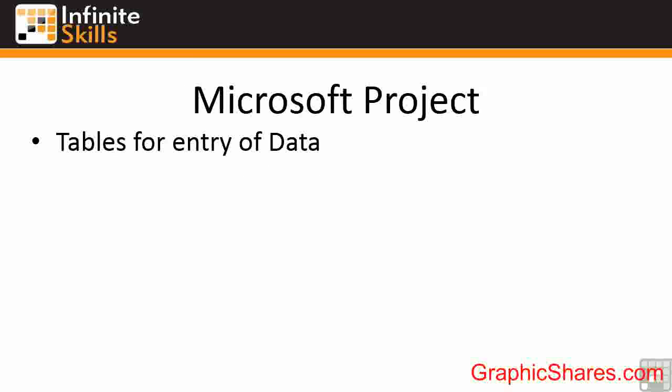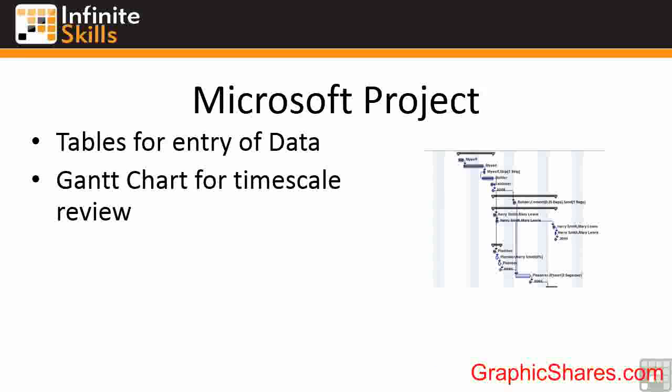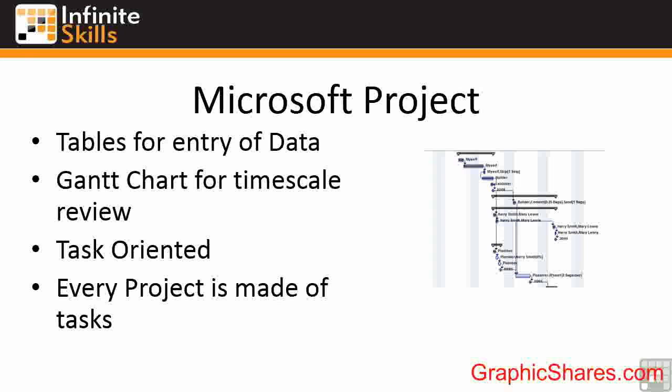In Microsoft Project 2013 we have a number of tables for data entry. These tables pretty much mimic Excel, so most people will hit the ground running. There is a Gantt chart for timescale review which builds itself — you don't actually build the Gantt chart, it builds itself from the data you enter in the data entry tables. The software is very much task orientated. Each task has a duration and eventually a resource. Every project has to be made up of tasks, and how minute and detailed those tasks are is down to you as the project manager.